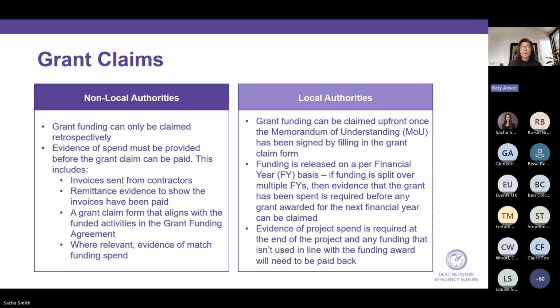So keep that in mind as well in terms of your project timelines. Evidence of the project spend is required at the end of the project, and any funding that isn't used in line with the funding award will need to be paid back. So it is good to keep your M&R reports accurate and up to date, so we can keep an eye on that in case anything needs to be changed and the full award is not needed.